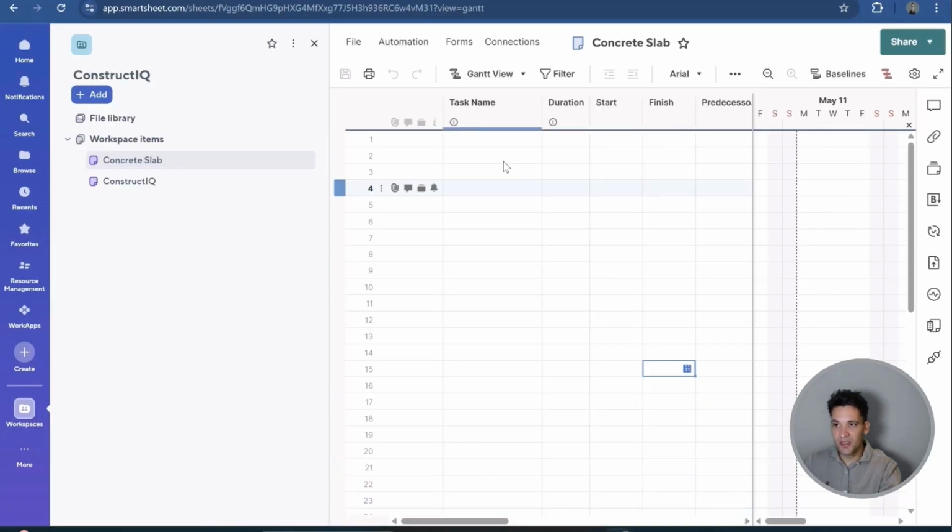So I'm using a simple Gantt chart software for this. The first thing we have to do is identify the tasks. We'll break it down into initial and concrete. So we've got mobilization, bulk earthworks, and materials. These are the 3 tasks that have to be done before we can start works. And then for concrete, once these are done, we can actually start the concrete works.